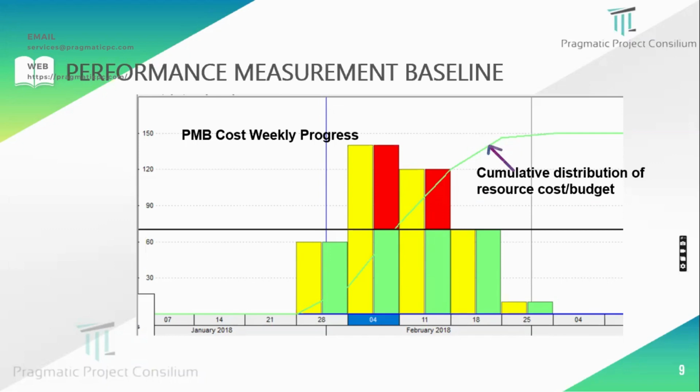Now, if you look at this carefully, there are two places where we can see red bars. It means our allocated resource needs to be leveled in such a way, because leveling means there is a restriction. There is a bottom line shown here, the limitations line.